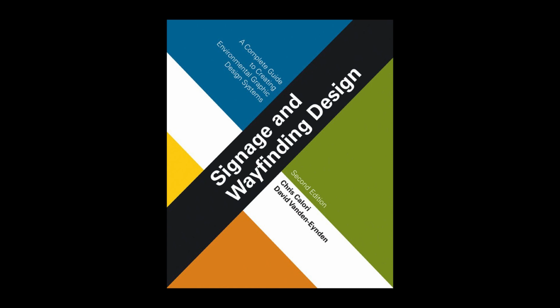Post-installation punch list inspections. Post-installation punch list inspections are also site visits, but now the EG designer and/or contract rep walks the project site to inspect the signs after they've been installed and enters any defects onto what is termed a punch list, which is why this inspection process is also called punching out.